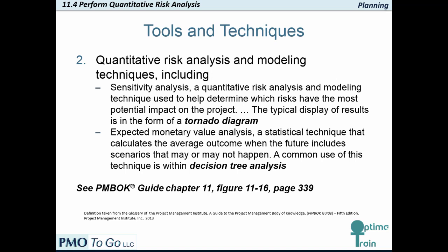Initial decision node on the left, outcomes on the right. You start a decision tree with a decision that you need to make. Draw a small square to represent this towards the left of the large piece of paper. From this box, draw lines towards the right for each possible solution, and write that solution along the line. Keep the lines apart as far as possible so that you can expand your thoughts.